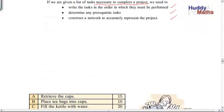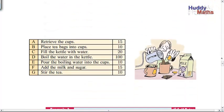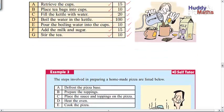So let's have a look. Here's an example. You might like to do this one. This is the time it takes to get the cups if you like, place tea bags in the cups. This would be in seconds, and do all these things. You might like to draw a network diagram for that. What has to come before what else? We're going to look at how to do this sort of planning. But the first step is to draw a table like this, so that you can see all the steps. And then let's look at it in action now.